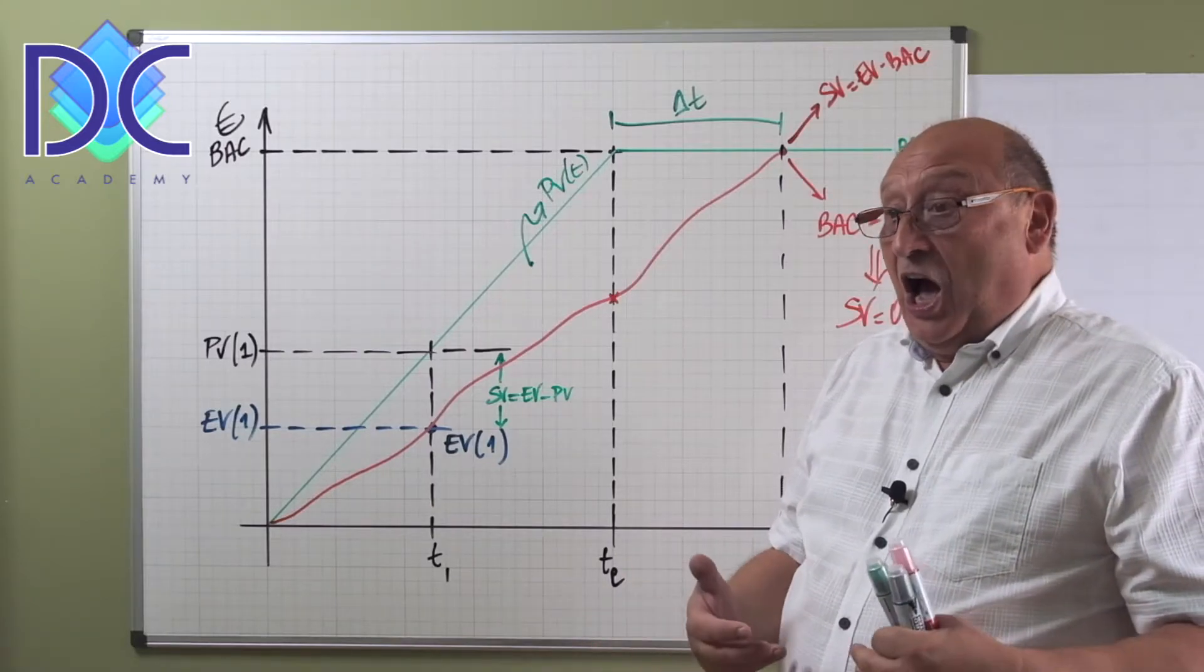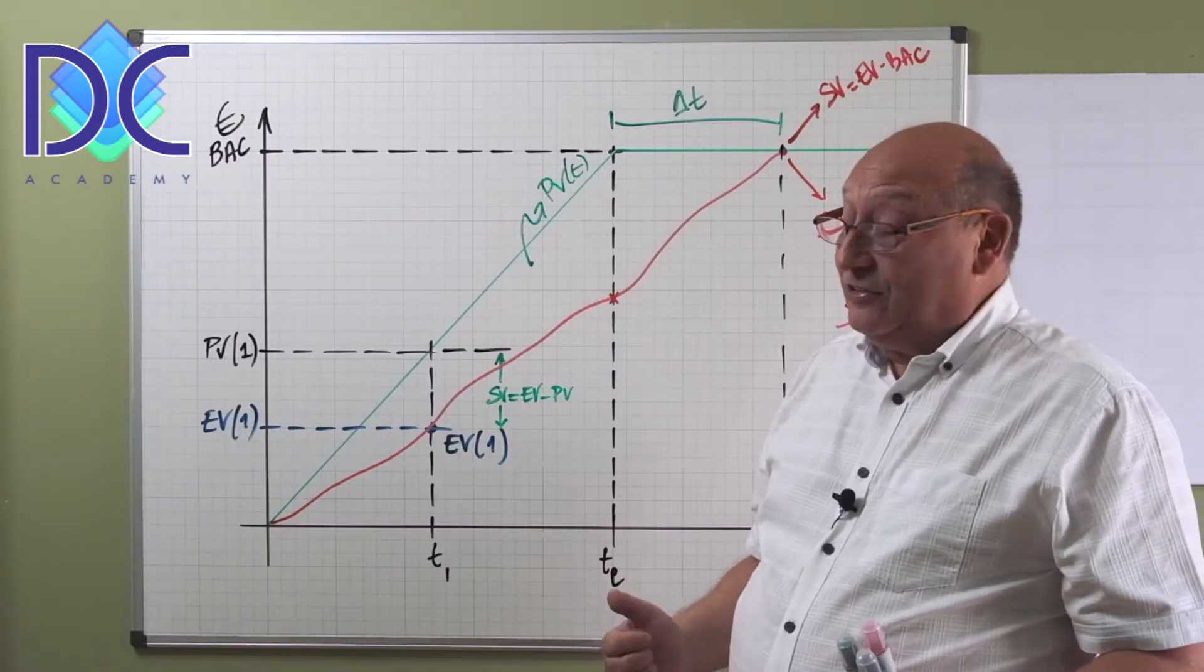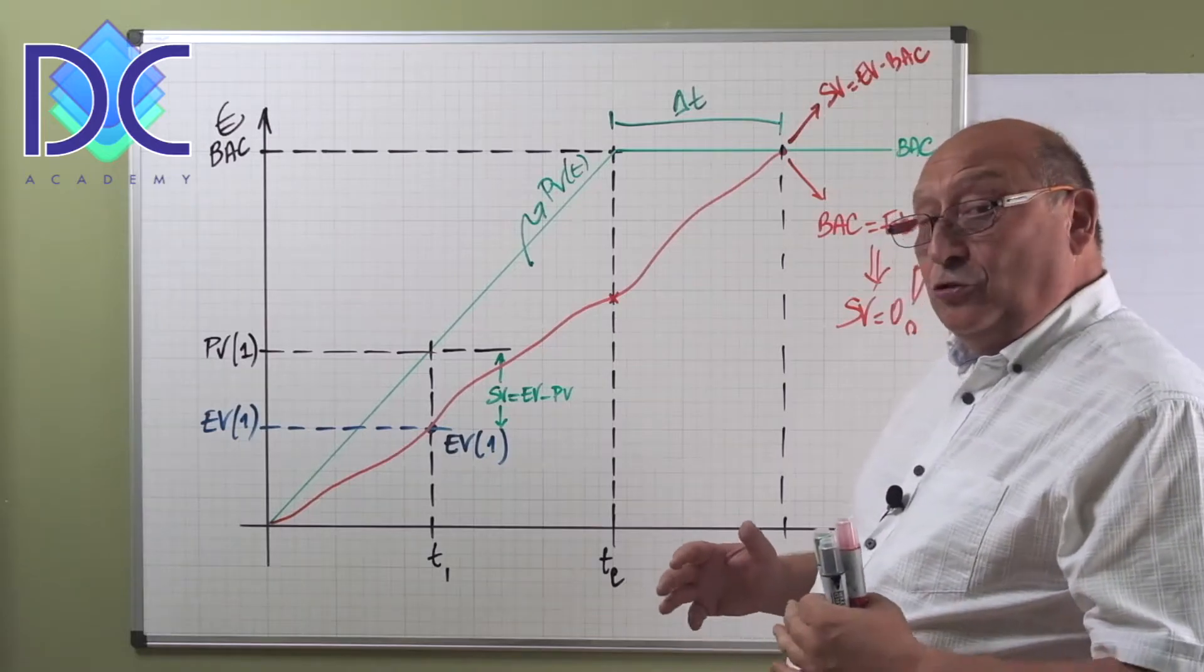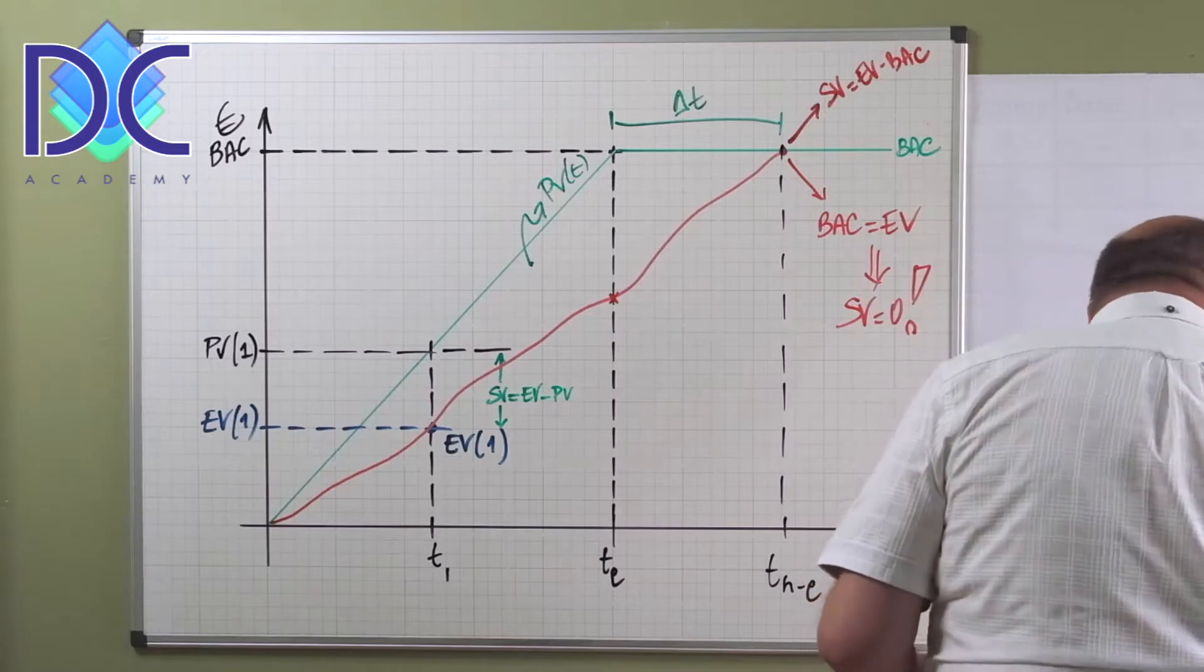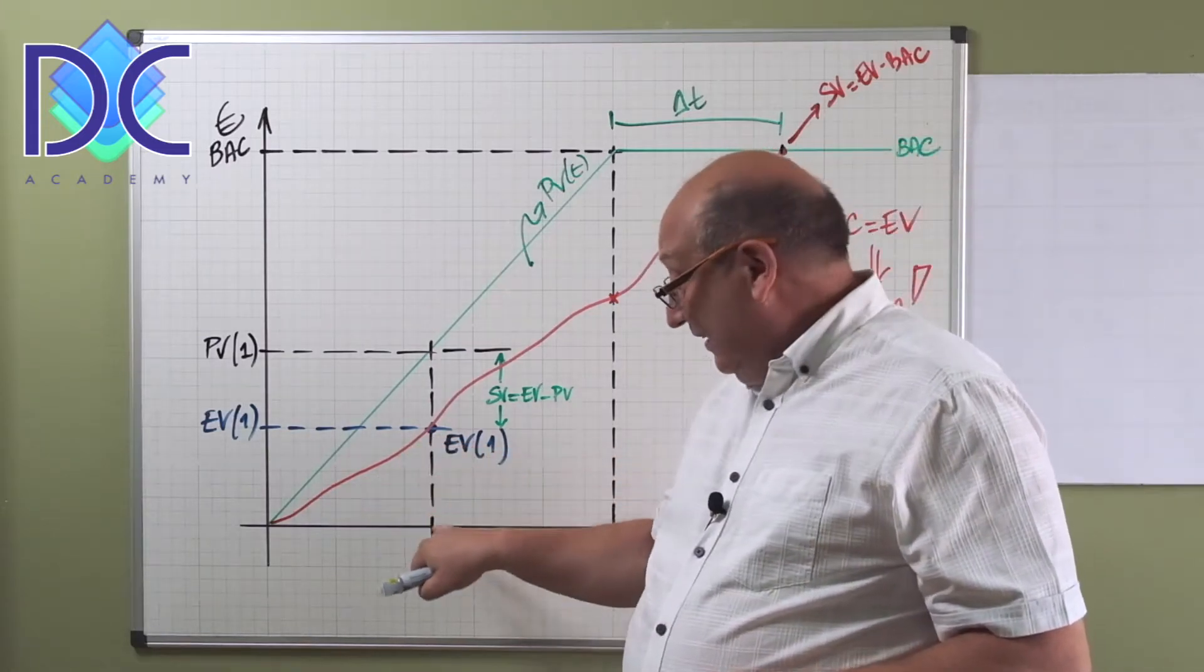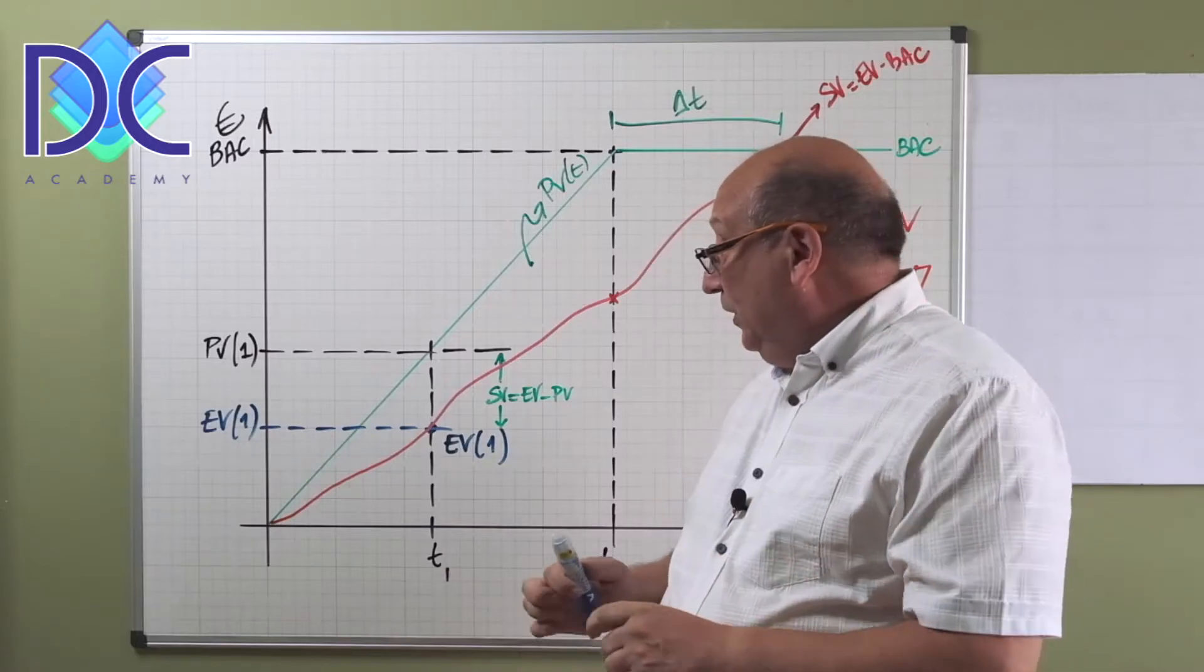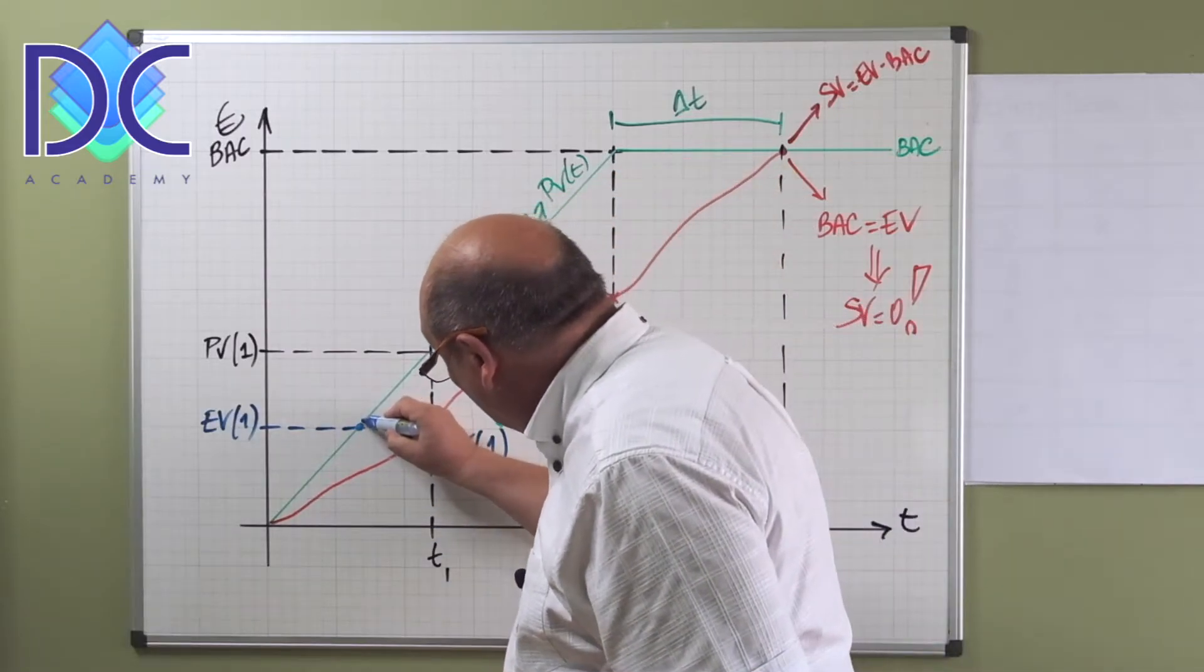And that's not really good because we have an impression here that we are improving, that our schedule variance is getting smaller. So basically we could say we are in fact improving our performance, our schedule performance, and it's not the case. Now to remediate this, we define a second parameter and we say,